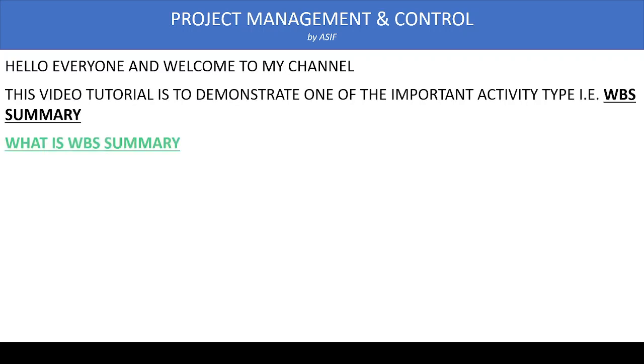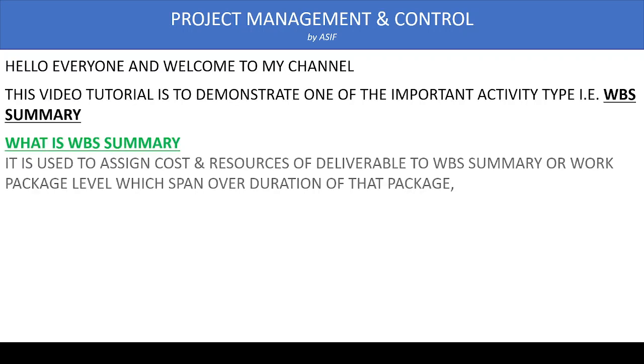So let's see what is WBS Summary. WBS Summary is the activity type used to assign costs or resources associated with a particular work package or deliverable to the WBS Summary level.